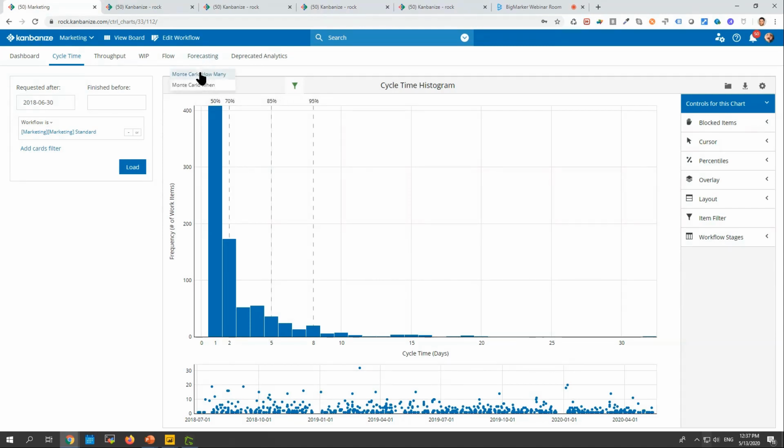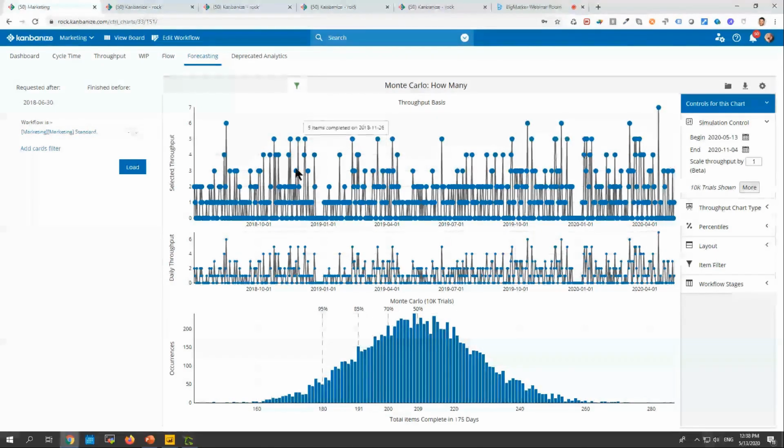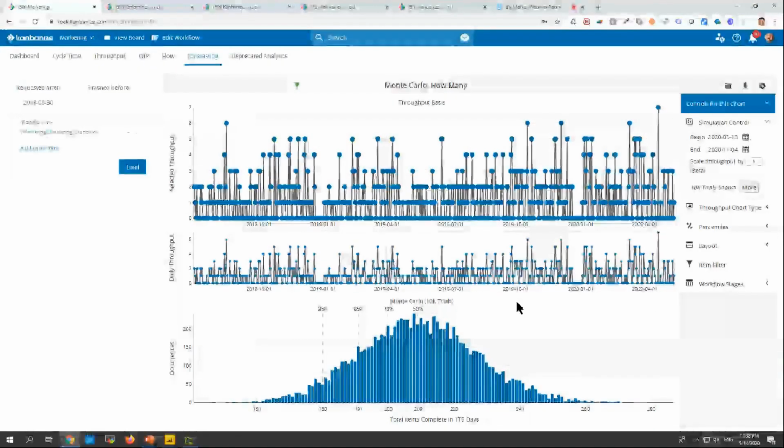If you do this consistently over and over again, like here, then those forecasts will be much more accurate compared to one item taking 1 day and one item taking 3 months. But if you achieve this stability of your process, then those forecasts, as you see, are a piece of cake.